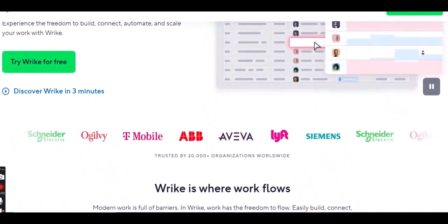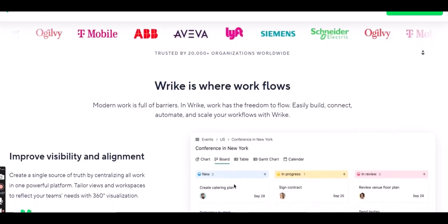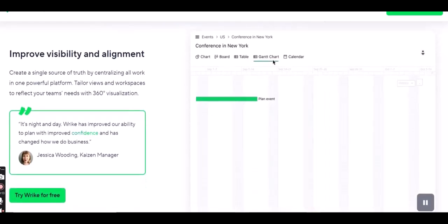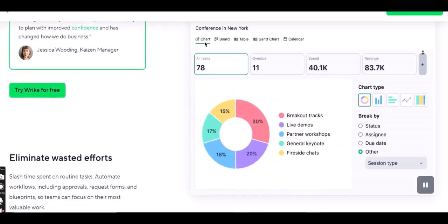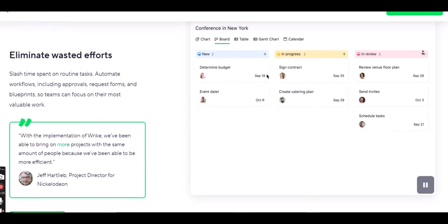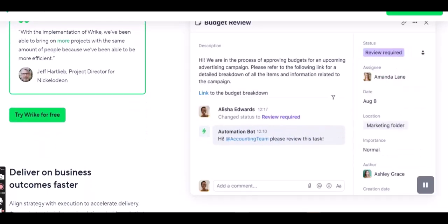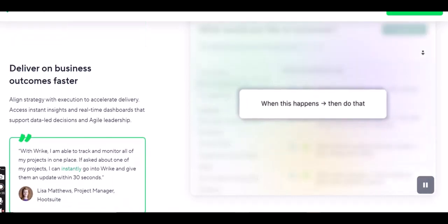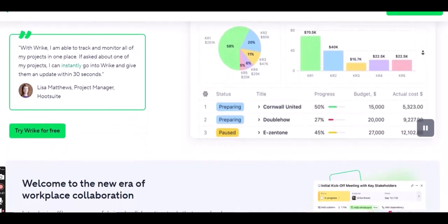Step 8. Filter your data. Crucial for focus. Filters are your best friend for narrowing down your report to only the information you need. This is where you remove clutter and focus on what's actionable. You can filter by almost any attribute of a task, project, or time entry. Common filters include status, show only active or overdue tasks; assignee, report on a specific team member or group; due date, show tasks due this week, next 30 days, or past due; creation date/completion date, report on work created or completed within a specific time frame.